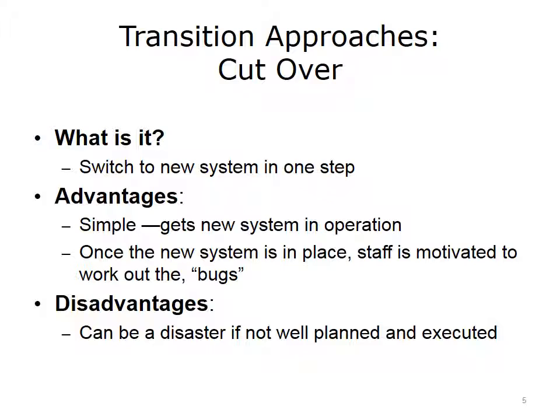Preparing for a successful cutover often includes having simulated what the operation will look like when the new system is in place, especially to ensure that the performance of the new system will be satisfactory. Of course, there is always an issue with simulation, so there can still be risk. But most important to a successful cutover is having a test environment that effectively mimics the operational environment. This way, new systems can be tested thoroughly against workloads that are representative of operational use.